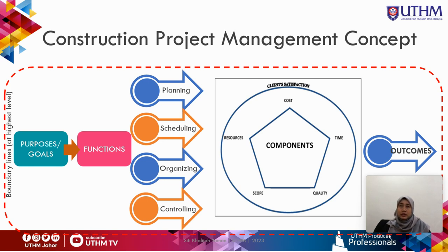It depends on where you are sitting, which chair you are sitting on. If you are sitting on the client side, your project planning and scheduling must include all stages from the design stage until the handover stage, until the defect liability period stage. If you are sitting on the consultant side, maybe your project planning and scheduling is much more important, especially on the design stage only.